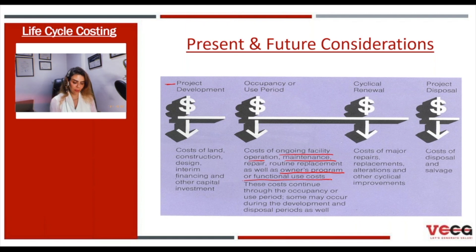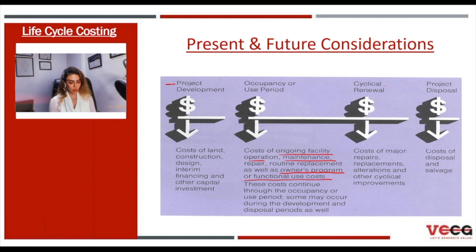This presentation references SAVE International. Regarding cyclical or renewal expenses, we have costs related to major repairs, replacement, alteration, or other cyclical improvements that could happen during the project lifecycle. And finally, project disposal, which could be the cost of disposal or the salvage value.